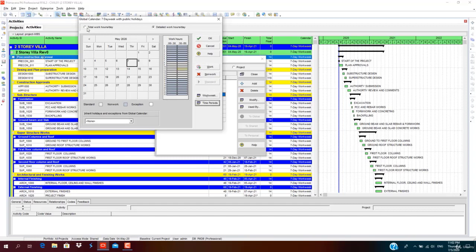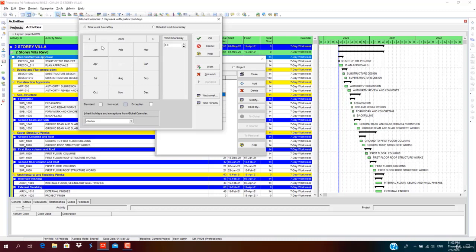And if you want to select some activities as non-work, you can do that. I'll show you how to do that. I'll be keeping the total work hours per day as the default for assigning a calendar, as I want to view only this format. Now I have to add some holidays for the calendar. So I choose some days, like 1st January is a non-work day. I select this as non-work. You can see the working hours per day has been changed.